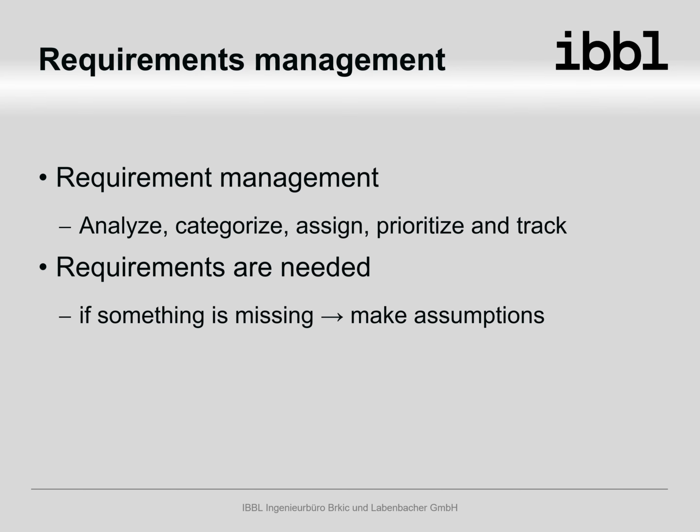Input information and requirements are necessary to design the plant. In case not all information is available when needed, a usual way is to make assumptions. If you are experienced in your field, you can make well-founded assumptions. During the engineering, these assumptions will be replaced by actual data. The works in different phases shall be executed within a specified time frame and effort.